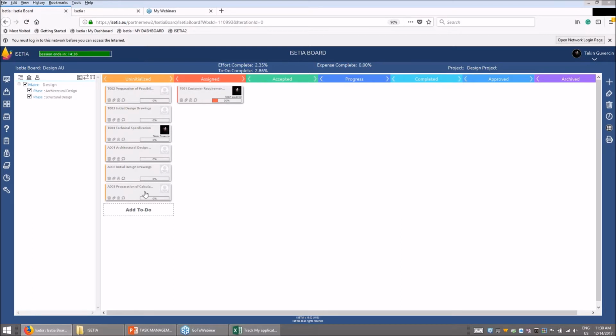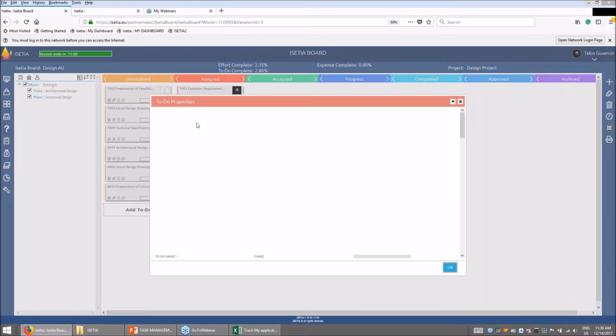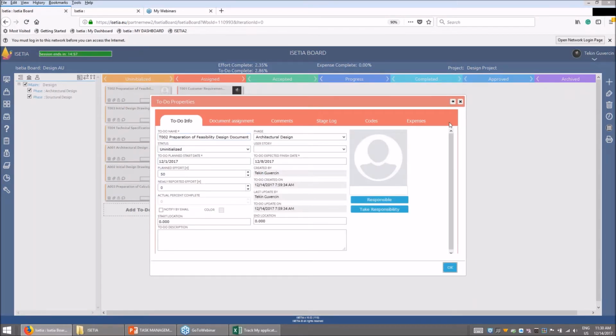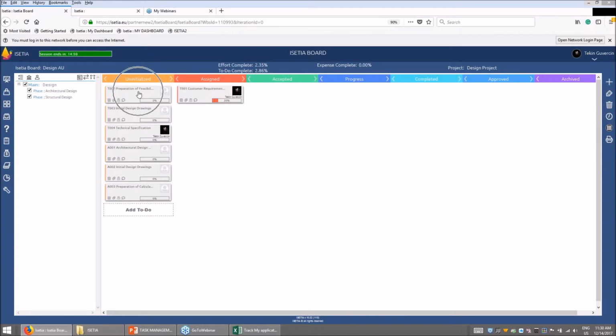So this is the same activity. Let's not create it again, and make the task number 2. And we are just moving these cards as assigned. Please see that this work is automatically updated 20%. Then we are selecting this and moving it to accepted. This work is 40%. We moved it here, 60%, and the colors also represent each stage and how many percent we have achieved.